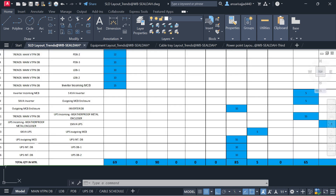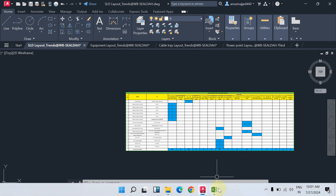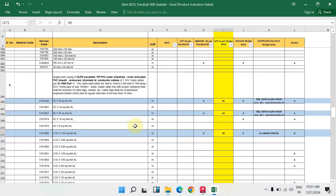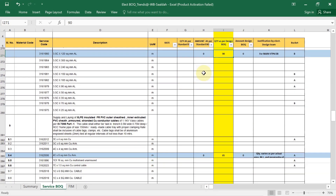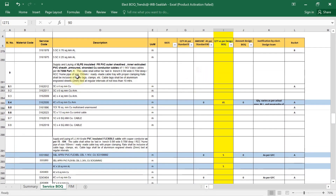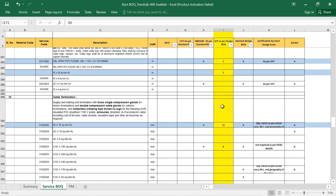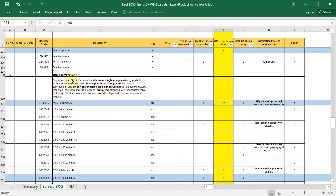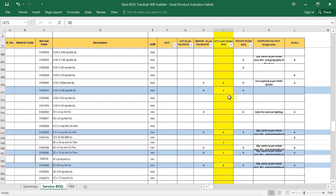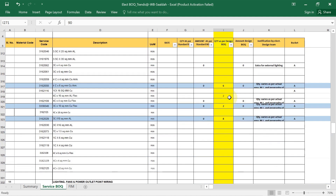From the UPS outgoing MCB to the UPS inverter DB, the running metre quantity is 55. As per the cable schedule you write down the quantity of each cable type. After that, also fill in the cable terminal table quantities.